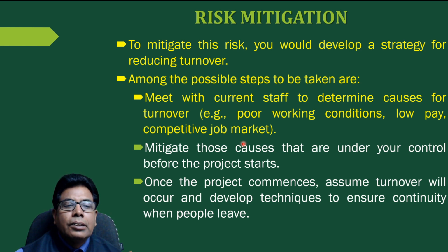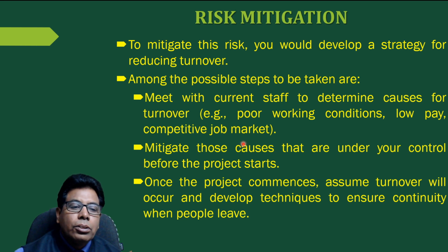You have to discuss with the current staff members and mitigate those causes that are under your control before the project starts. So whatever causes are there, if the project manager can eliminate those causes, then the turnover can be reduced. And once the project commences, we assume that there is going to be turnover, and you have to develop techniques to ensure continuity when people leave.